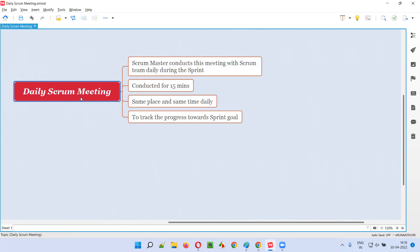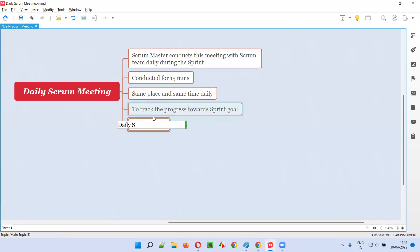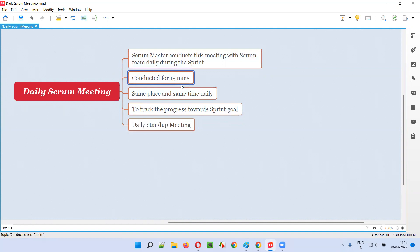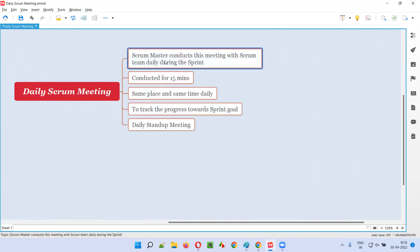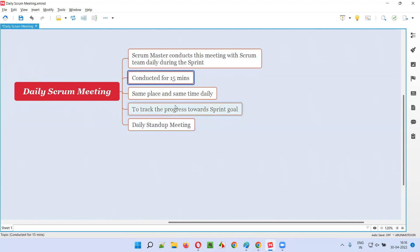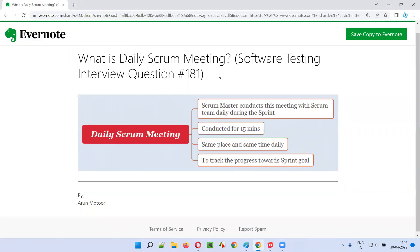There is another name for the daily scrum meeting: the daily standup meeting. It's called a standup because during the 15-minute meeting, no one sits down — everyone, including the scrum master and the scrum team, stands while sharing their status and progress toward the sprint goal. That's all for this session; see you in the next one.